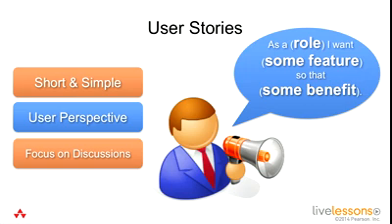We know it's not us. We're not usually consumers of the products we make. So who is that person that we're actually trying to meet their need? And the benefit is to explore the value of it so that when I'm trying to prioritize one story over another, if I can know what the value is to that customer, I can prioritize it a little bit better. I can do a comparison.